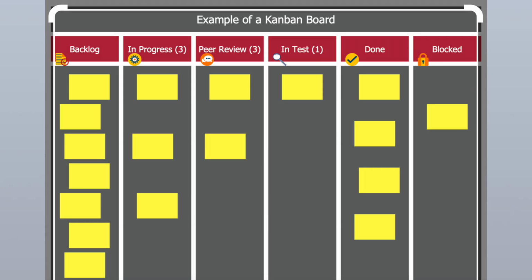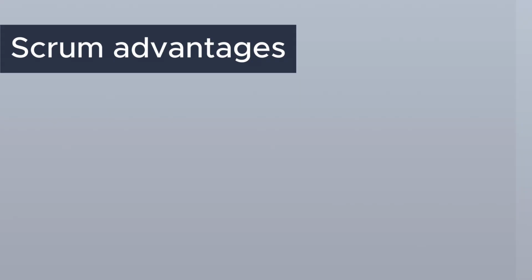Typically, people think about Kanban as a board that has a list of all tasks that should be completed. However, Scrum also has a board and it even can have the same columns. The main difference is that Scrum splits work by sprints, as we have already mentioned, and Kanban just takes tasks with the highest priorities. Let's take a look at the advantages and disadvantages.